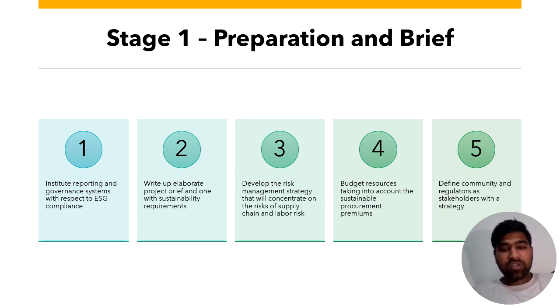traditional builds. The project manager works closely with the sustainability officer and the design team to draft these specifications. We also ensure early stakeholder engagement with the community to gather feedback and begin building trust. This becomes the foundation of the project, and a formal gateway review is conducted to ensure all ESG elements are incorporated before we proceed to design.